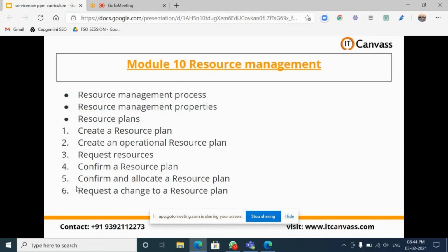Resource management in the organization: every resource has some price based on the hourly rate. Generally, when any project comes to us, the bidding is like, we are giving this many resources, and for each resource this many dollars per hour. In that way the project bidding happens in every project, in every organization.